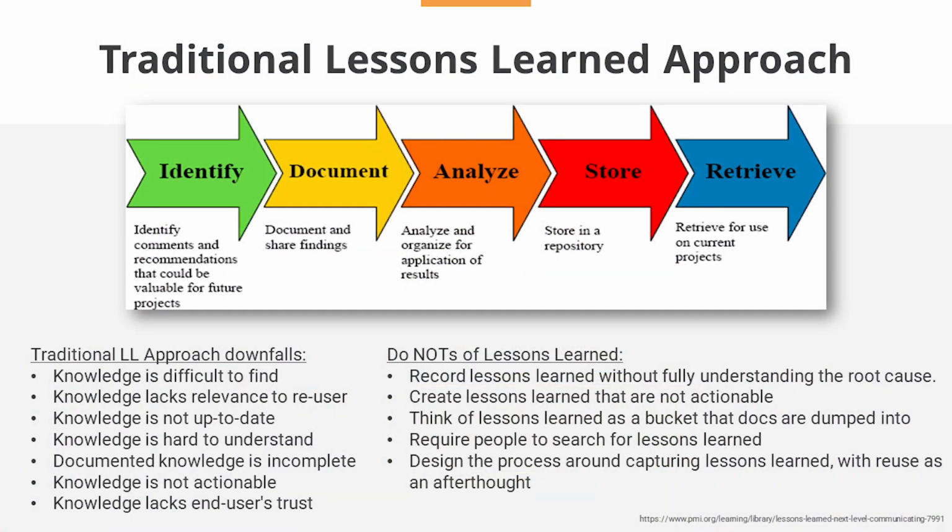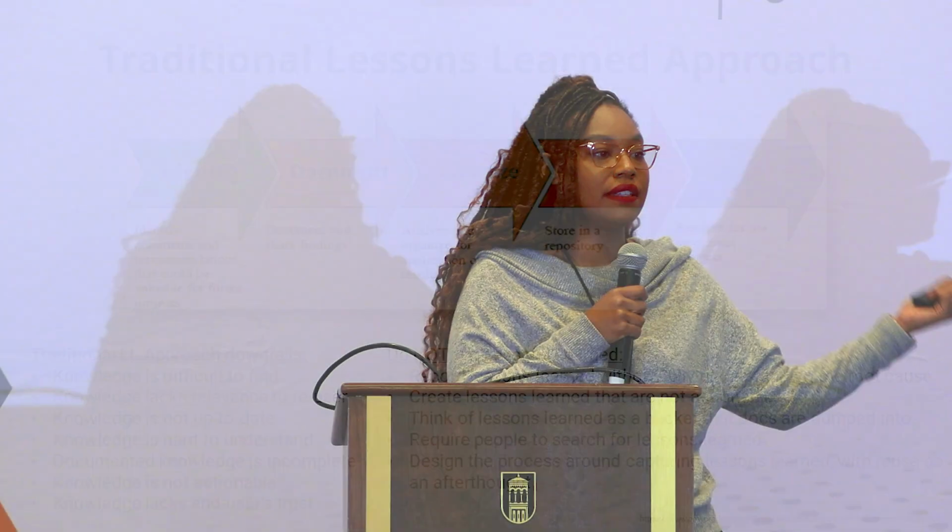So according to the Project Management Institute's definition of the traditional lessons learned approach, a lesson learned is identified, captured in a way, and documented. Once that lesson has been identified and documented, there's some sort of analysis process that is undergone, where there's instruction on where it needs to be put thereafter. That lesson learned is then stored, and then somewhere down the line there's some sort of trigger, or somebody knows to retrieve that lesson to put it back into your development process.